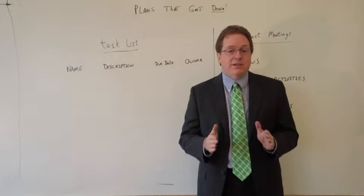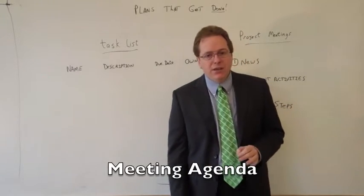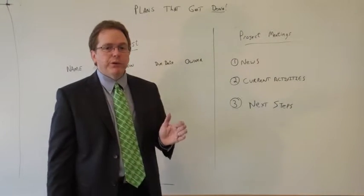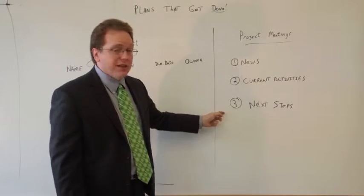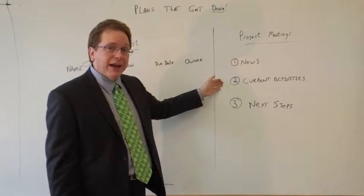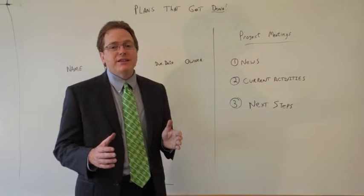This one task list gives you the outline for the project meeting agenda. Now the meeting agenda is simple too. This is a piece of paper that's broken up into three sections. First, project news. Second, current activities. And third, next steps. So let's break these down.